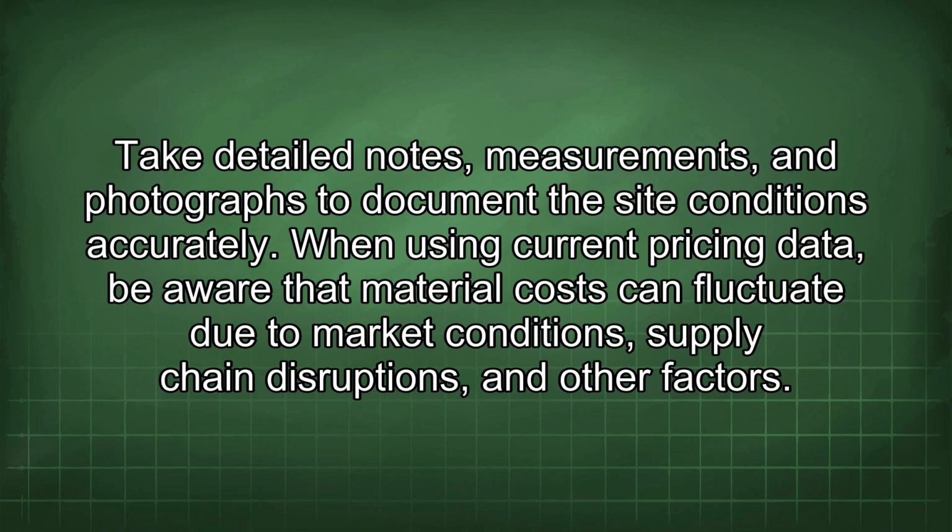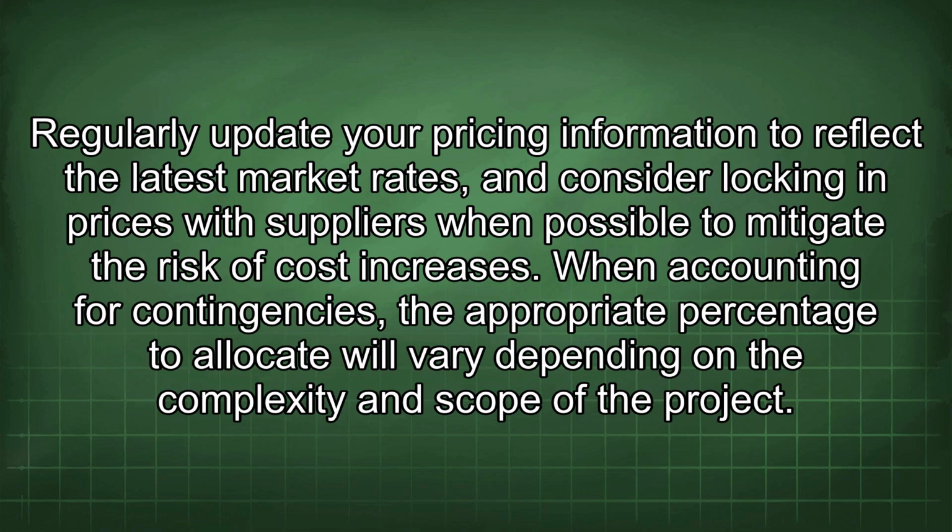When using current pricing data, be aware that material costs can fluctuate due to market conditions, supply chain disruptions, and other factors. Regularly update your pricing information to reflect the latest market rates, and consider locking in prices with suppliers when possible to mitigate the risk of cost increases.